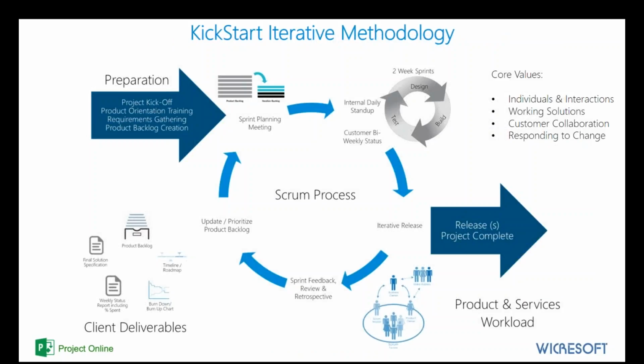And then ultimately, for the configuration pieces that we do for you that are unique to your organization, beyond the KickStart, that build to order process, we use an iterative methodology. We take more agile concepts in doing this. So instead of doing a big deployment where here's your solution at the end and then tell us how you like it, it's an iterative process with customer involvement all the way through, meaning we deliver capabilities in 2-week sprints on a regular basis, to the degree that you have those that you'd like us to do, and then you review, accept, and give us your blessing that we're on the right track, as well as the ability to release that capability into your production environment as frequently as you would like.